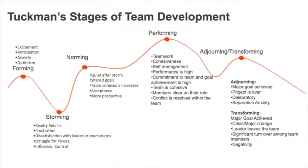There are several steps to launching an effective team. One is team members get to know each other better. Two, the team's purpose is clarified. Three, the team has norms. Four, how decisions get made is agreed upon. Five, the team project is identified. Six, team roles and responsibilities are defined. Seven, a communication plan is created. And eight, a project plan including a timeline is created.